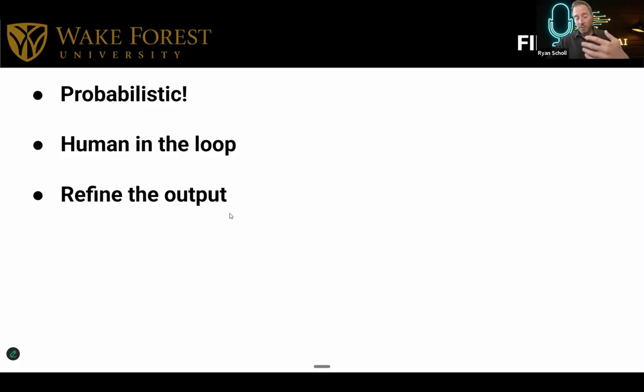For example, in the example I did, all those outputs I got. So when I got the charter, I cleaned it up a little. I refined it. And then when I made the requirements, I put the cleaned up charter back in. I didn't use the one that was initially produced. I took that one, spent 10 minutes, edited a few things. And then when I made the requirements, I used my edited charter as an input to the requirements.